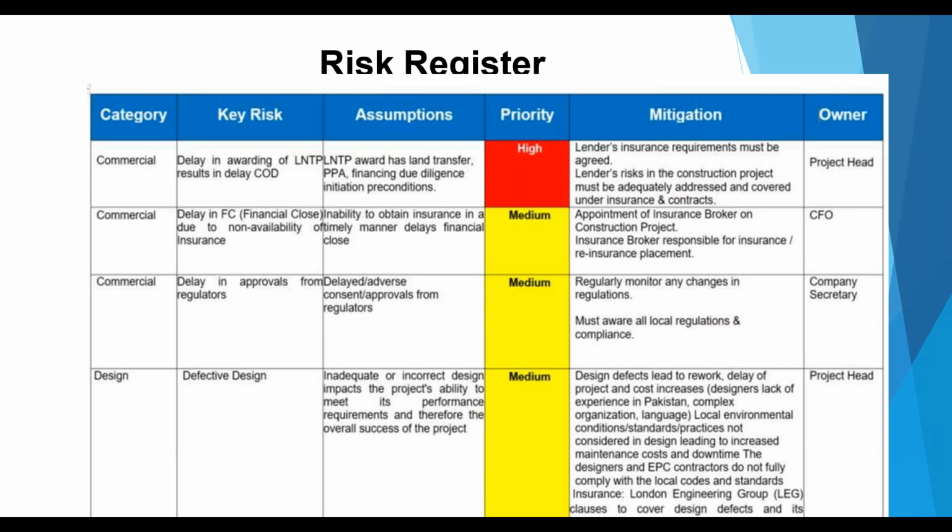The final part is the risk ownership, which is very essential for the project risk register. You need to identify the department or any responsible person who is responsible for managing or treating the risk. So that's why ownership is one of the important components in the risk register. So, next slide.